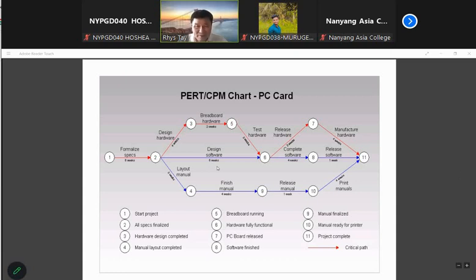So in construction activity, most of the time, let's say building a building, they have many so-called work breakdown packages. This work breakdown structure, the package will be done by the engineer. They break up the various jobs into piecemeal, and they know which one comes first, which one comes later. So at the end of the day, you will meet the target.